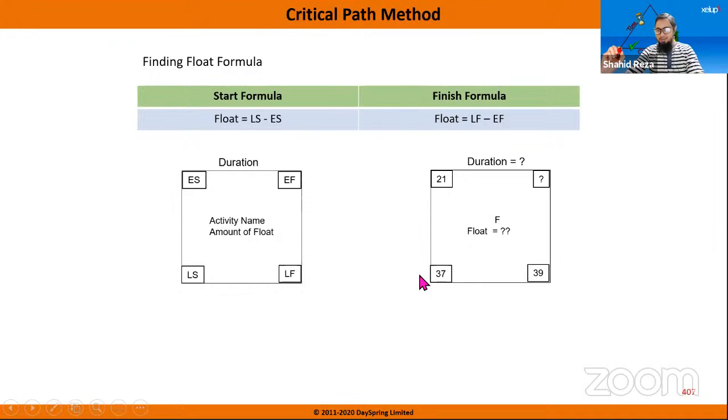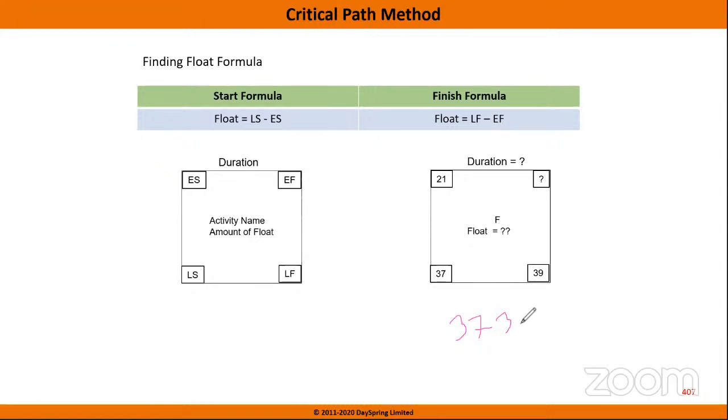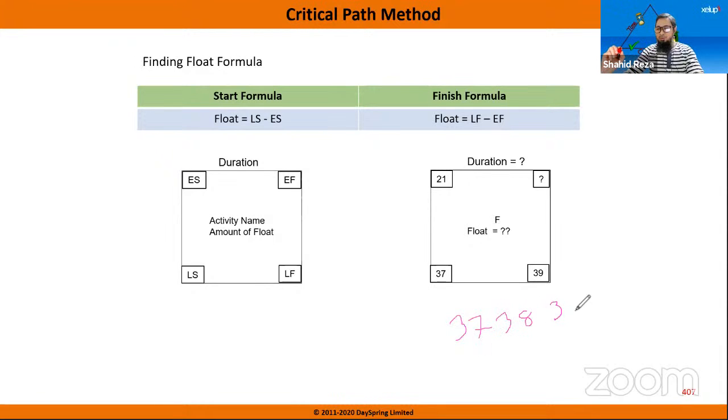Very easy but tricky. Can you say again, Raja bhai, where does this 2 in 21 plus 2 come from? Still not clear to me. No, not 2. This is actually 3. 2 plus 1. I am saying like this, let me write down here. 37 day, 38 day, and 39 day. All inclusive actually. All inclusive. So that's why 3 days.